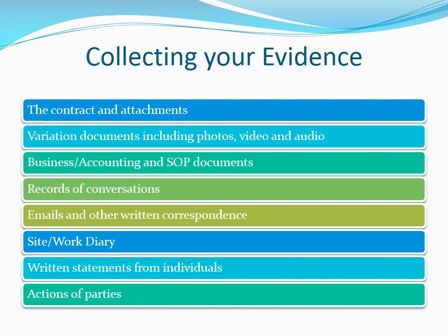Generally, your evidence should automatically be collected through your normal business processes. Occasionally, you may need to generate additional documentation as evidence, such as a more detailed invoice from a supplier than you would normally get, or take written statements from witnesses or photos showing disputed work. But generally, this should be the exception rather than the rule.